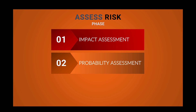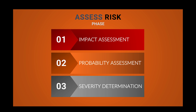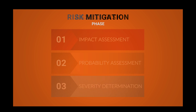Second, Probability Assessment: determine the likelihood or probability of each risk occurring. Analyze historical data, expert judgment, and external factors such as skill levels to gauge the probability accurately. This step helps us understand the chances of the risk materializing. Third, Severity Determination: combine the impact and probability assessments to determine the overall severity of each risk. Assign a severity level to prioritize the risk effectively. This allows us to focus on addressing the risks that have the highest impact and likelihood of occurrence. By following these steps, we can gain valuable insights into the potential risks associated with the architecture development process. Once we have assessed the risks, the next phase is to determine the risk mitigation approach.